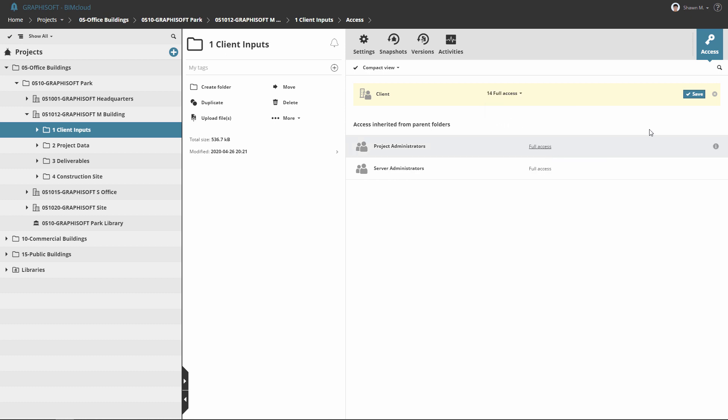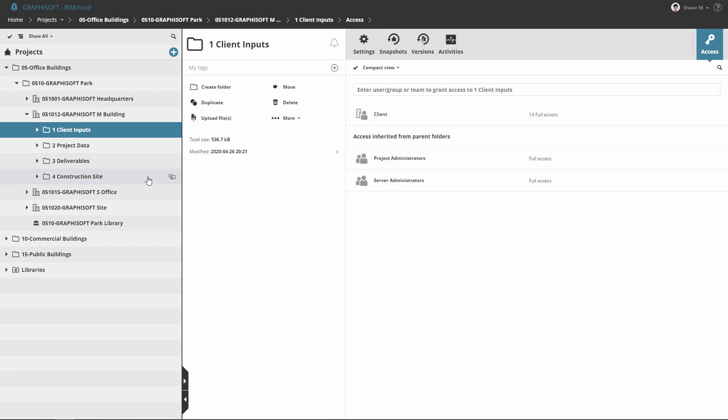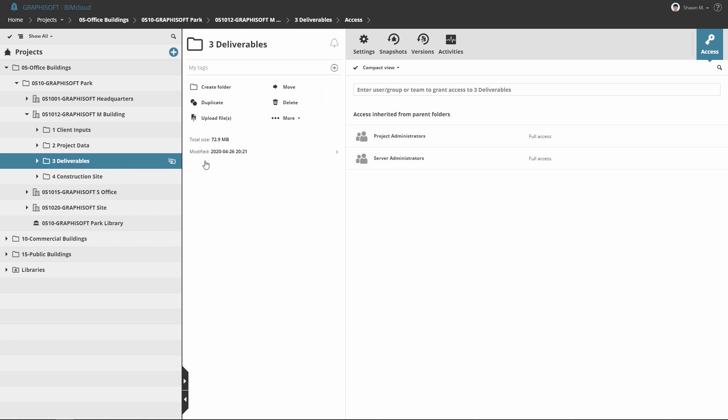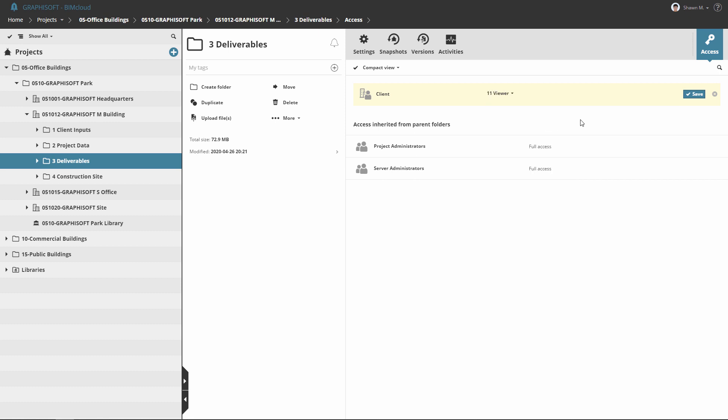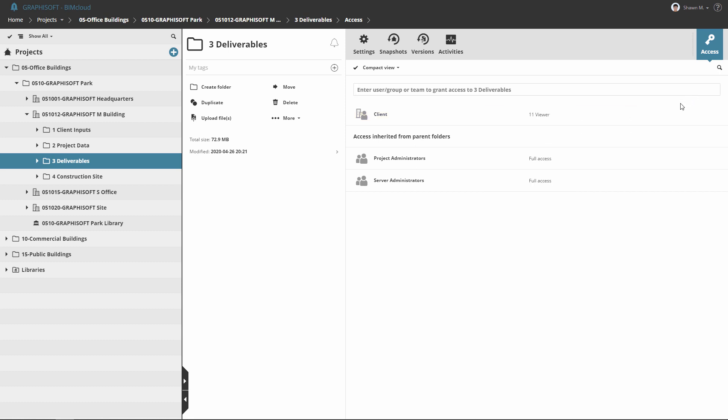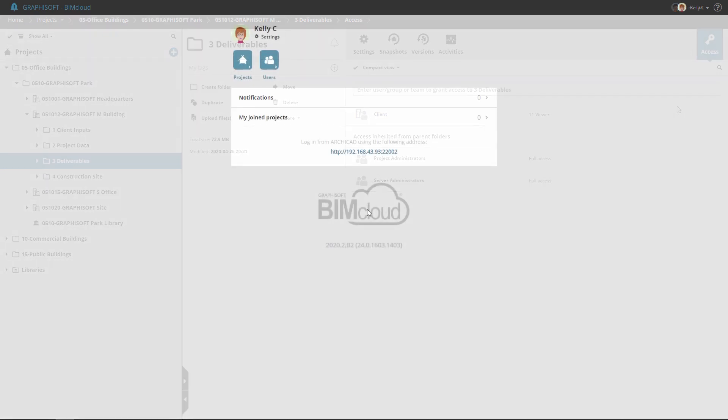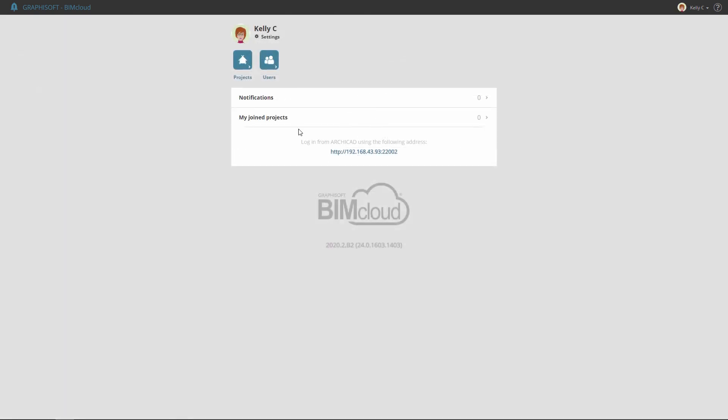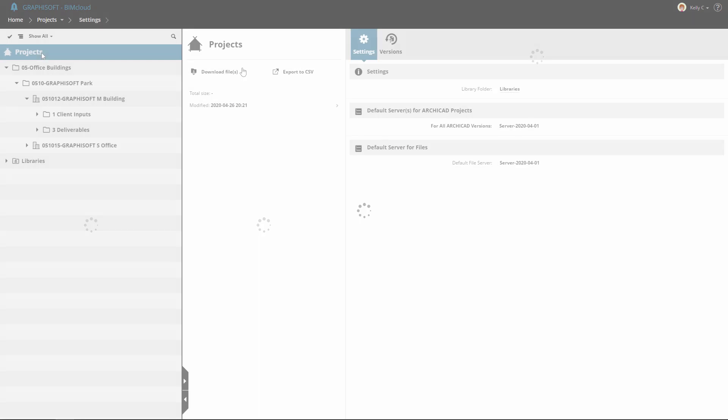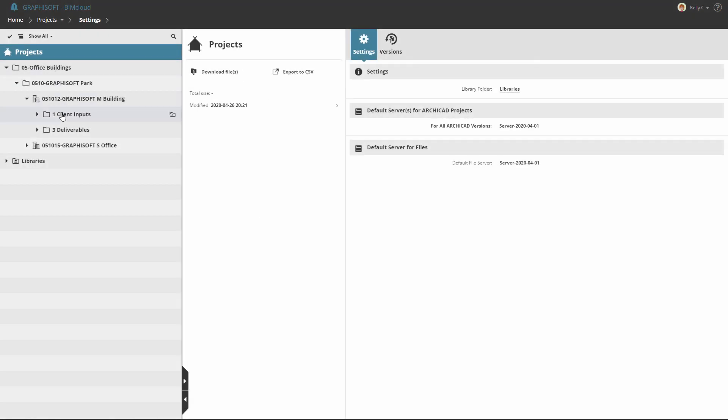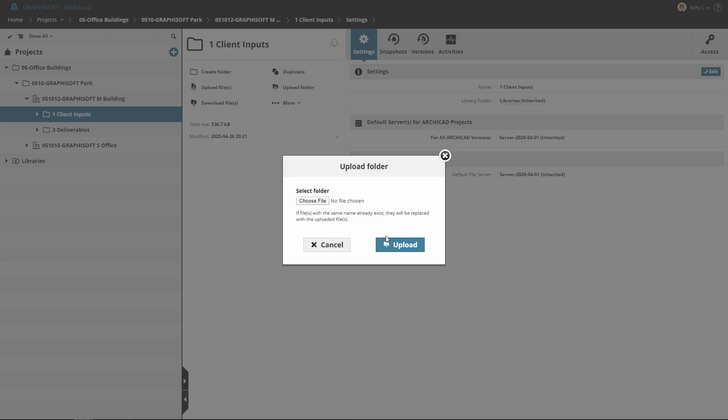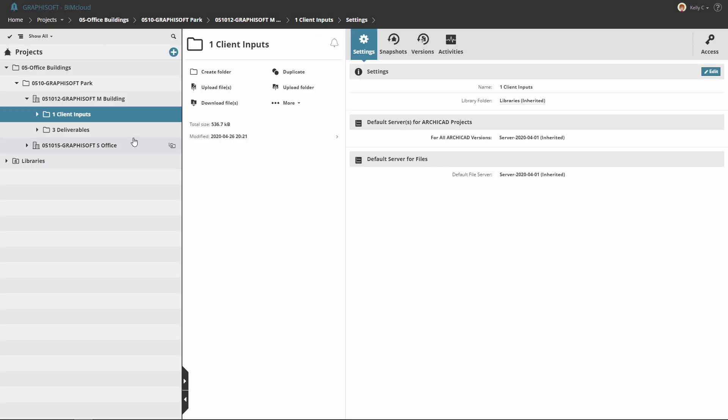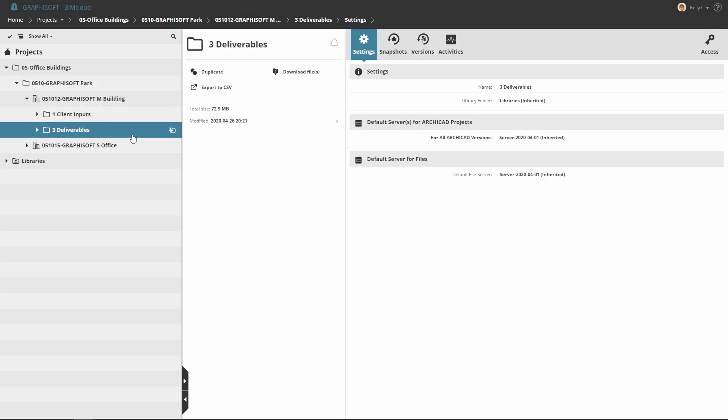In our example, the Client team can get full access permission to the Client input folders and Viewer role for the Deliverables folder. With these, Kelly, the client, can download and upload into the Client input folder, but can only view and download the content of the Deliverables folder.